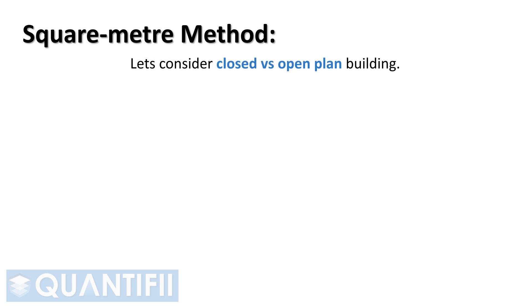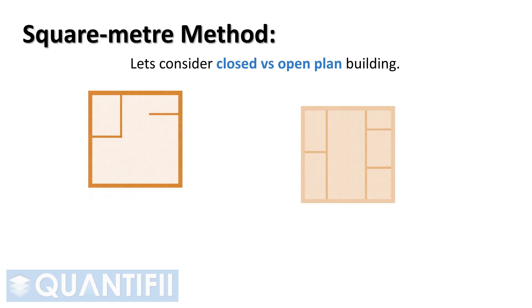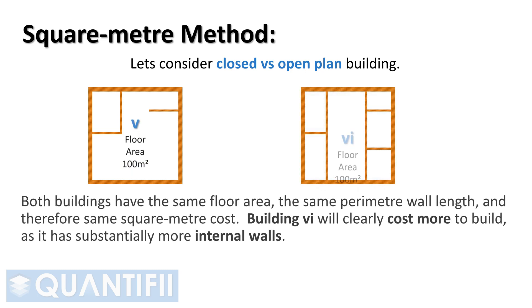Lastly, let's look at closed versus open plan building. Both buildings have the same floor area, the same perimeter wall length, and therefore the same square meter cost. Building six will clearly cost more to build, as it has substantially more internal walls.